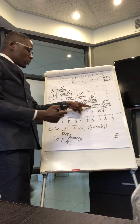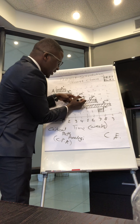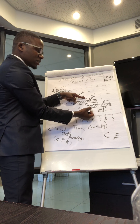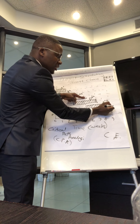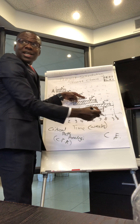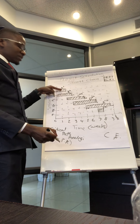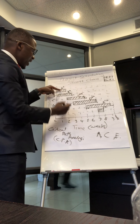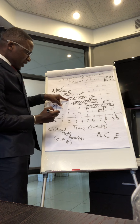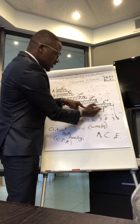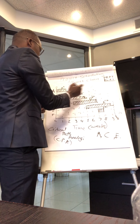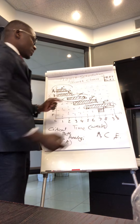Look at what happens if you delay C: if it's supposed to finish here and you delay it and finish it later, then E will start later and finish beyond week nine — meaning the project is late. What does C depend on? A. So A is also critical. If you move A by one day it will move C, which moves E, meaning the whole project is late. So A, C, and E are the critical activities.